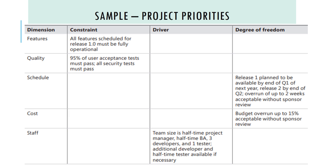For schedule, Release 1 is planned to be available by the end of the first quarter of next year, and Release 2 by the end of the second quarter. An overrun of up to 2 weeks is acceptable without sponsor review, so we have a 2-week margin for schedule.